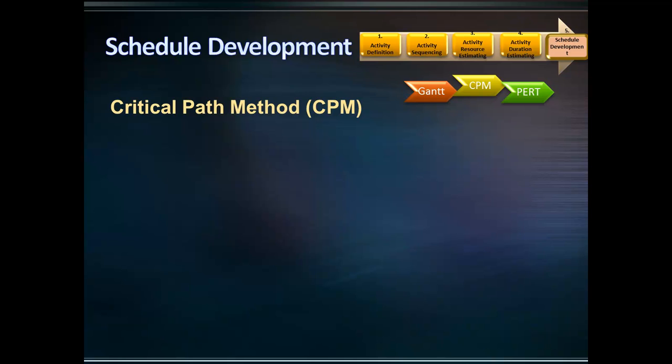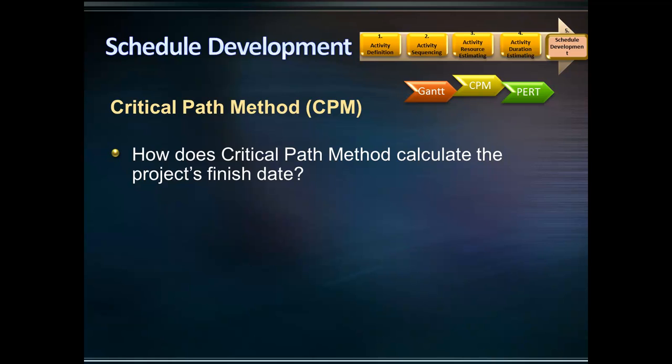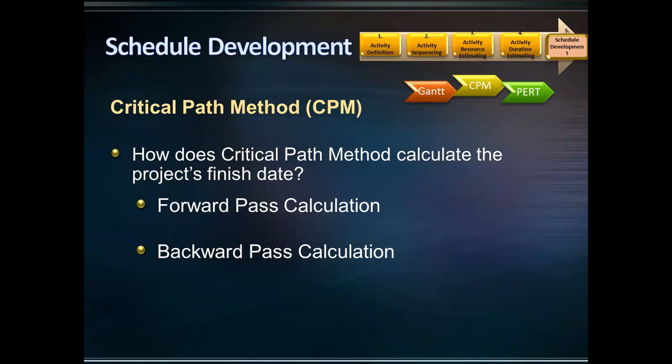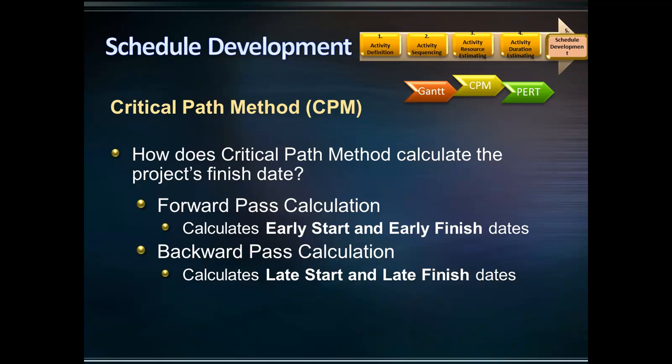To calculate the project's overall duration, the Critical Path Method uses two calculations: forward pass calculation and backward pass calculation. In the forward pass, the early start and early finish dates are calculated. In the backward pass, the late start and late finish dates are calculated. But what is the early start, early finish, late start, and late finish?